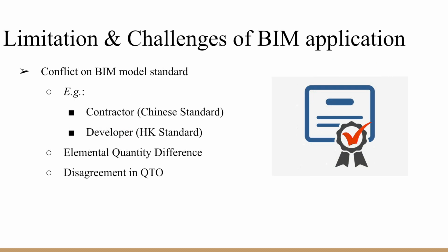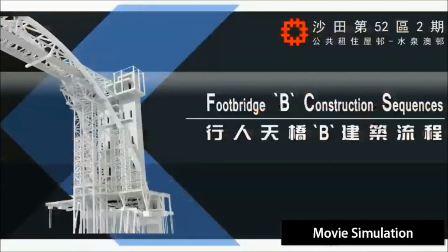Further, as the contractor and developer come from China and Hong Kong respectively, if they apply different BIM standards, for example the Chinese standard and the Hong Kong standard, conflicts in elementary quantity rate and quantity takeoff difference might arise and cause arguments.